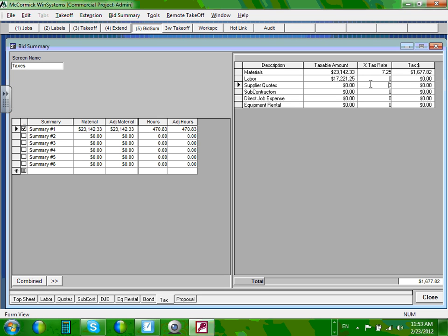Okay, so why don't you guys assign a tax to material only? Can you see the material only? We are not going to tax labor, though I think there's a few states that tax labor. If it taxes labor, then you assign a tax right next to the labor. 7.25. Can I have thumbs up? We taxed the material, Chad. We got you. Okay, so you're going to have almost $1,700 for tax on the material that you bought. Gentlemen, we're done. And lady. That's it. You assign, does it make sense?